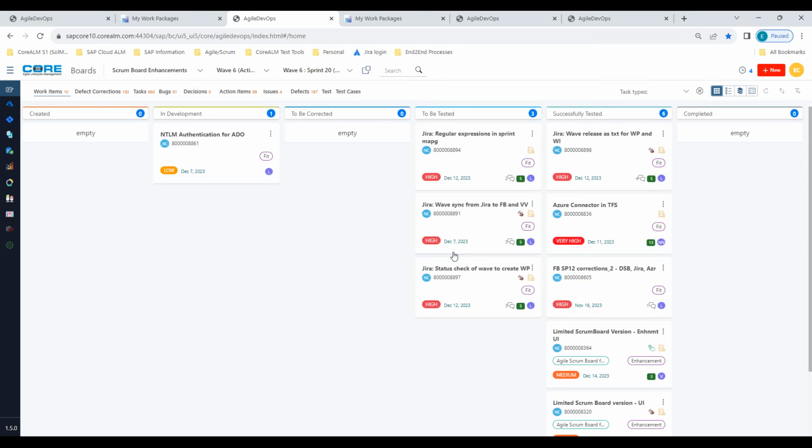So as we're transitioning from the explore to the build phase, and we have the entire bucket of requirements, we've broken those requirements down into the work items level. And this is where we can actually start planning our sprint. So for example, if you look at the very top here, we have the project, we have the release or the wave, and then this is broken down on the scope of work at the sprint level. So if I'm looking at here, this would be all of the work items, all the deliverables that are in scope for a particular sprint, or sprint 1.